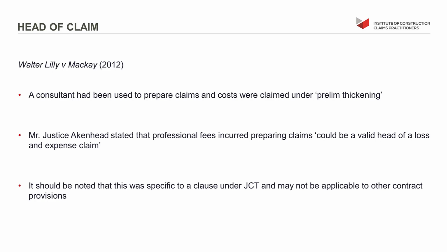So we should note that this was specific to a claim under JCT. I think it was JCT 98. And we shouldn't necessarily assume that this would be applicable to all standard forms or to bespoke contracts. However, from my understanding of that clause, I think it's clause 26 in JCT, I don't think there's any wording there that is unique to JCT and would preclude you from claiming somewhere else.